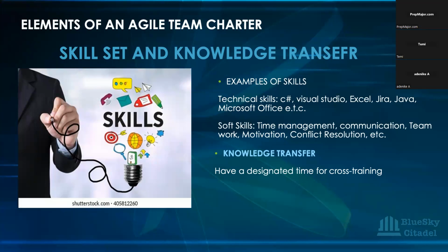Just understand how you want to be cross-functional and how you want to have some form of cross-training within the team, because it can actually improve your test process. For example, if you have two QAs and one person is not available, you know that it's not going to be a problem because the other person is already trained on what that other person can do. So it's a really good practice.